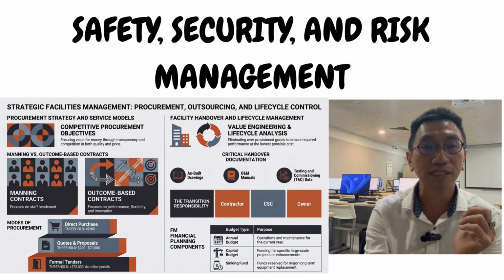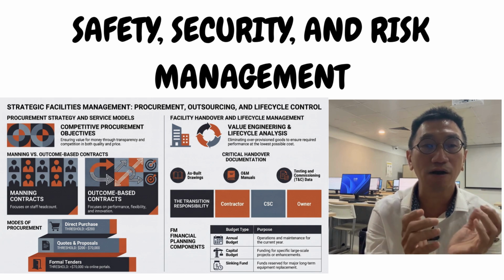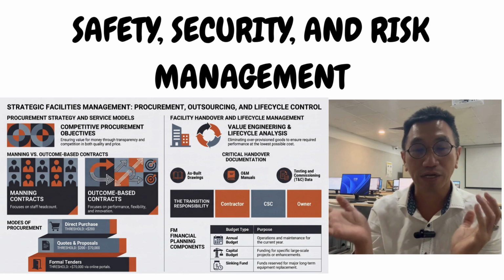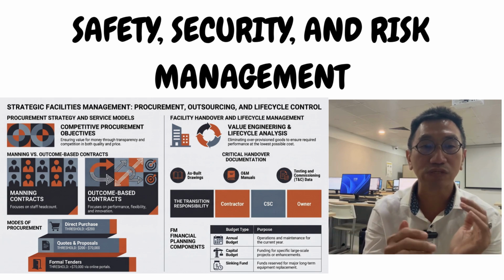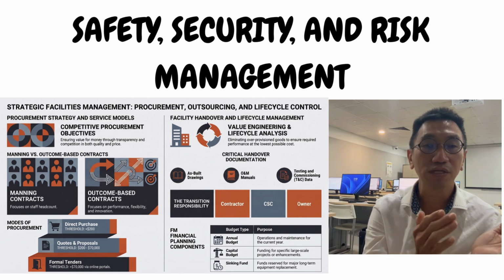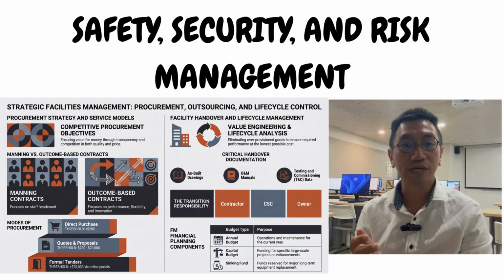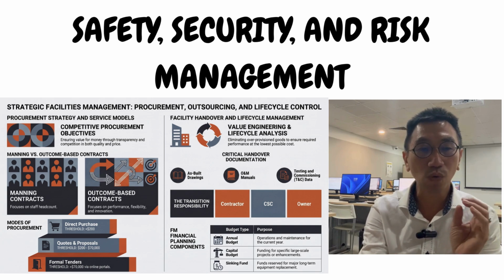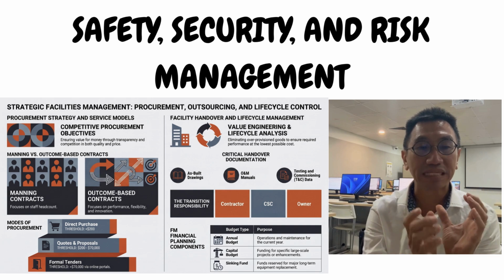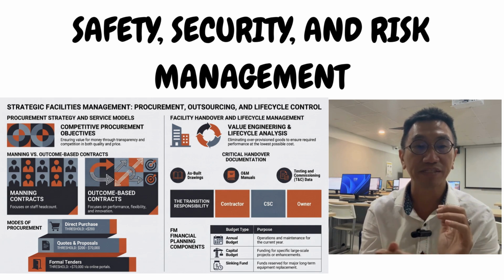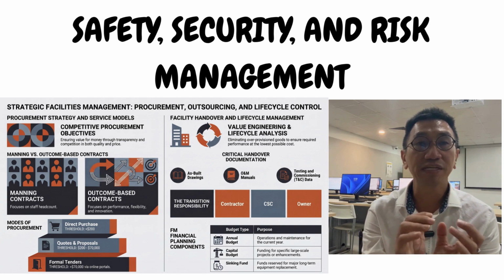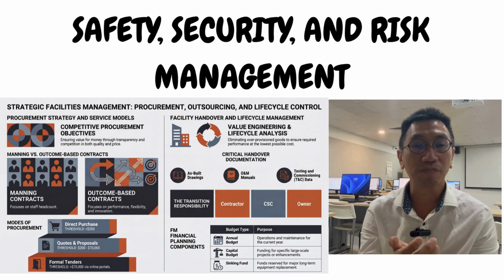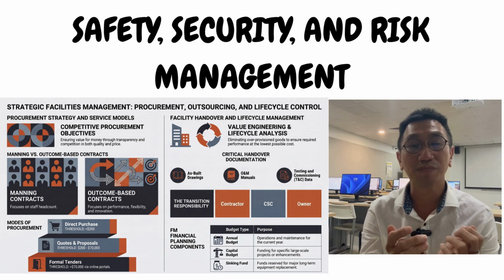So with these few points, take a look at how procurement and outsourcing can be done and how life cycle analysis can be done, and when we are taking over new facilities from old facilities, what the transition point will be from a TOP, which is temporary occupation permit, to CSC, certificate of statutory completion. So the whole idea involves the operation and maintenance manual, which strictly follows a developed and effective maintenance system plan. Involving the maintenance staff earlier will verify that the system is installed properly and avoid expensive and, of course, risky modification later.